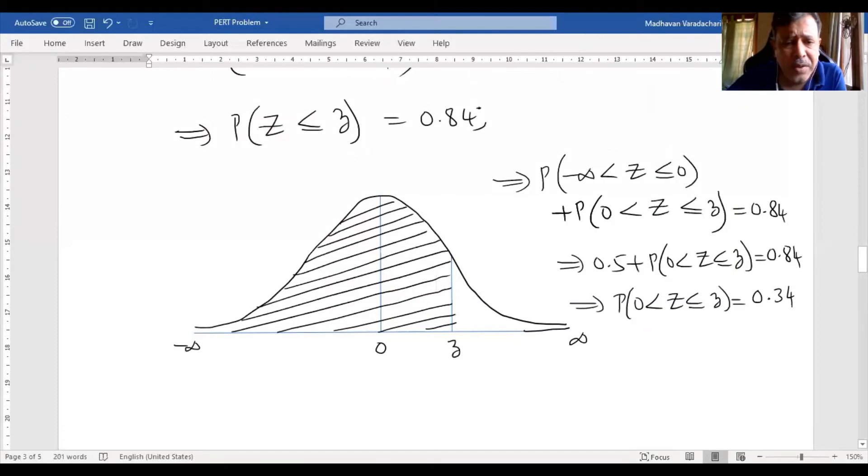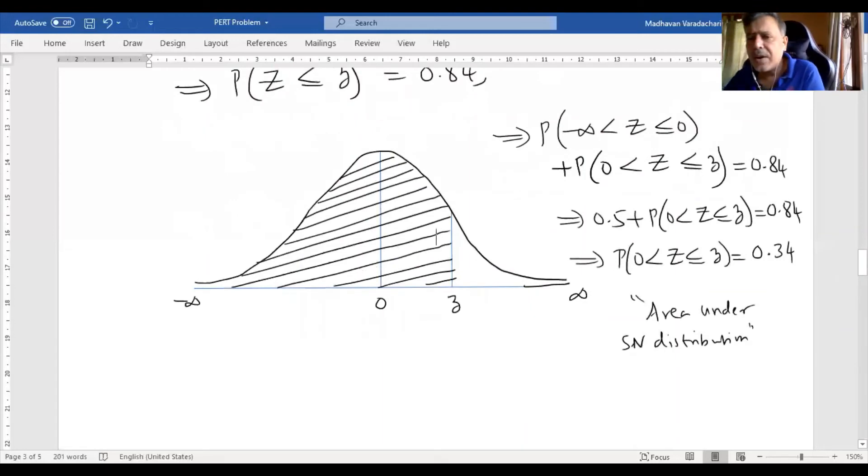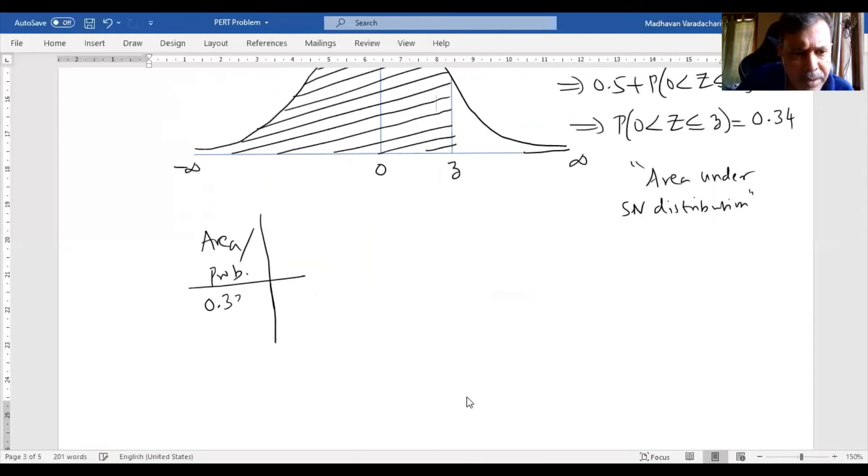The first one is 0.5, so 0.5 plus probability of 0 less than z less than or equal to small z equals 0.84. Therefore probability 0 to z equals 0.84 minus 0.5, which becomes 0.34. I need to identify the z value from the area under standard normal distribution tables. If the area is near 0.34, one number I could get is 0.3389.